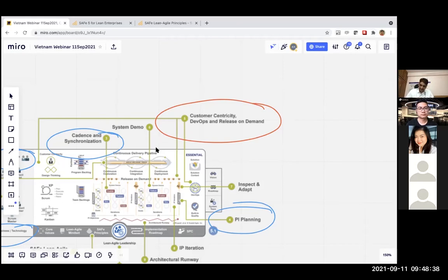The sixth factor that we would talk about is the system demo, right? So this is just here. Any one of you who uses Scrum knows that every 2 weeks you would make a new build, call your customer or the representative of the customer, and showcase a demo to them. Likewise, even in SAFe, every 2 weeks, once the teams have shown what they have built, we want all the teams together to integrate that